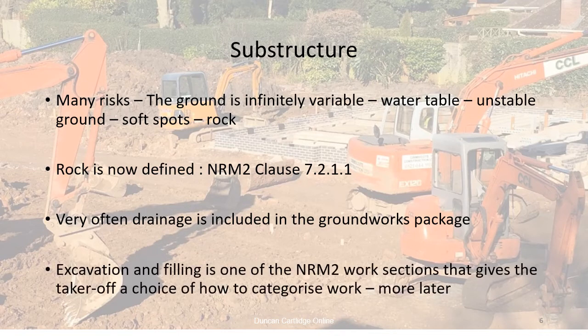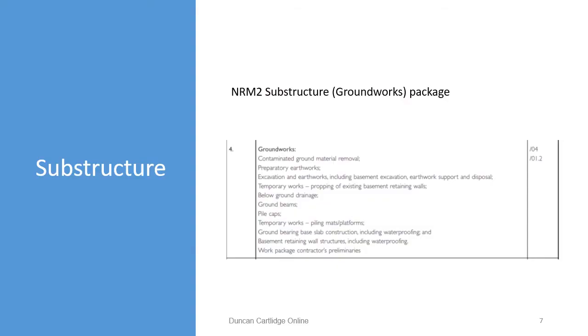For logistical reasons, underground drainage is generally carried out simultaneously with the substructure work. This example is taken from Appendix G of New Rules of Measurement 2 and details typical contents of a groundworks package. Note the inclusion of below ground drainage.